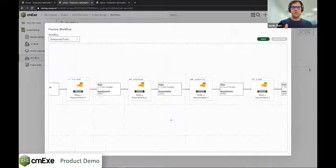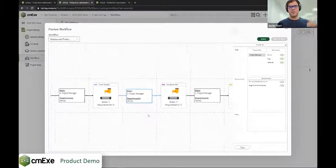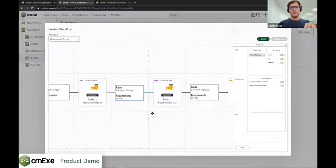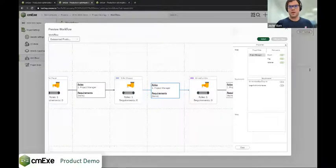We're going to drill into one of these. This workflow is basically the steps that you're seeing inside the model in the dashboard to go from raw materials, fabricated, shipped, installed, signed off on site. What you're seeing here is the ability to actually build control into your process. You say what user persona, what profile, is allowed to progress a status from, say, order shipped to received on site, and are there any requirements? Do they have to set up a cargo workflow, for example, before they can go from this step?